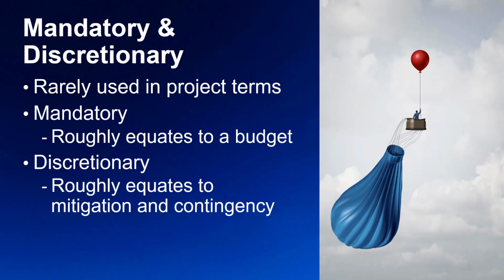Or if we feel that an opportunity can be exploited, say providing free resources to the project, then taking a stakeholder to lunch might be at our discretion. However, if there is no risk associated with the expense, there is no money available to the project manager to use. The risk must be associated with an appropriate contingency reserve.